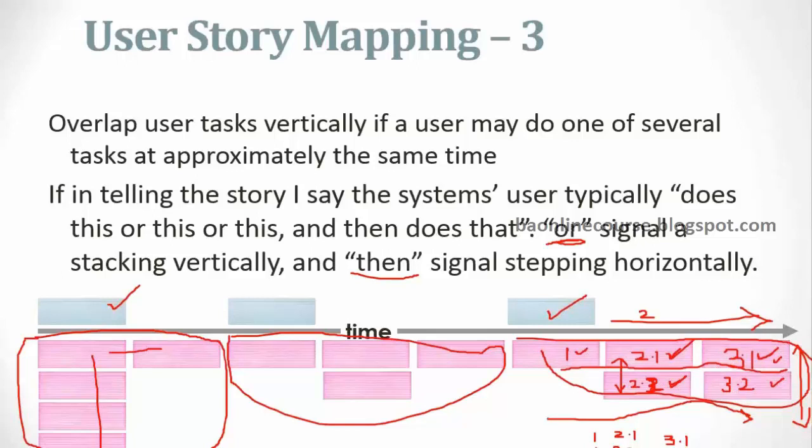Then I could say 2.2 and 2.3 I can have in the second release, right? And some other requirements which are there in release 3. So across these epics or higher user stories, we are picking up the most important ones, and you'll pick up only those which you can do in that 3-week time window. Okay, in that particular sprint. Okay, that is the process which you'll follow.